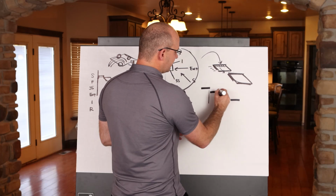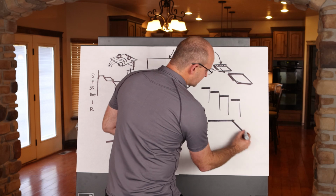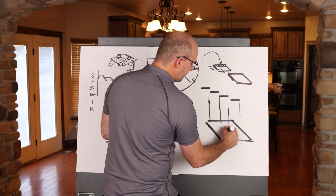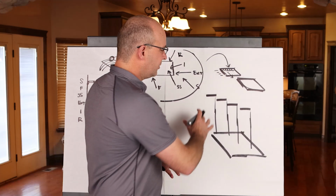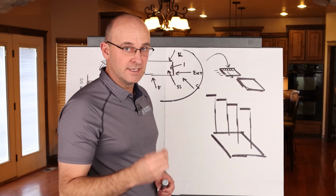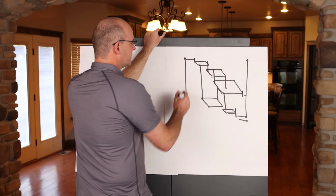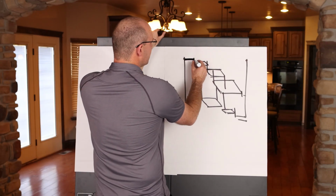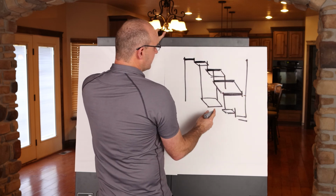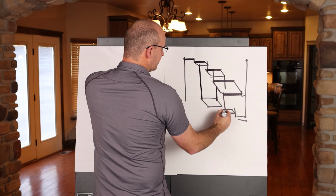And then this kicks off different phases for my interiors. So I was actually able to sketch out the interiors with it and really tie these together for different portions of the interiors. So you're really starting to validate these sequences with your trades after you do the initial sketching. Once you have the overall structure and you know, hey, these are the phases, and this is how they're going to tie together, and I generally think that this is how the interdependence works between the phases.